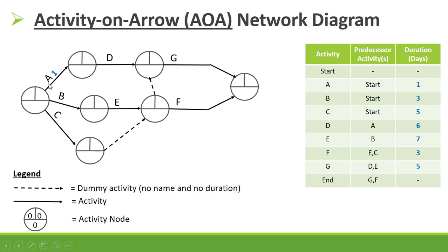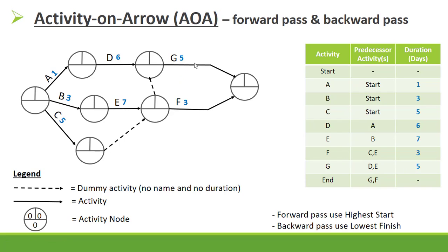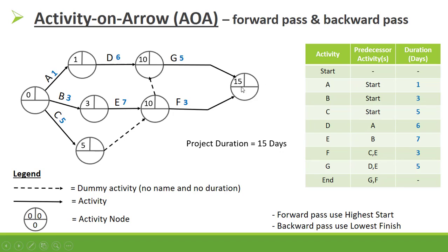The duration of A is one day, B is three days, C is five days, D is six days, E is seven days, F is three days, and G is five days. For the forward pass, we start with zero. Zero plus one is one, zero plus three is three, zero plus five is five. Then three plus seven is ten, or five — we use the highest, which is ten. One plus six is seven, or ten — we use ten. Ten plus five is fifteen, and ten plus three is thirteen — we use the highest, which is fifteen. Our project duration is fifteen days.